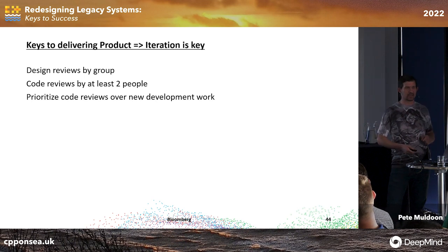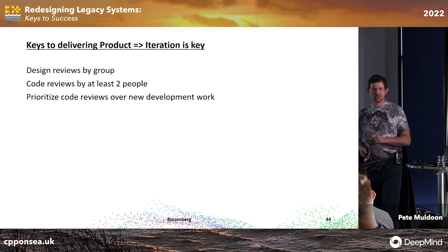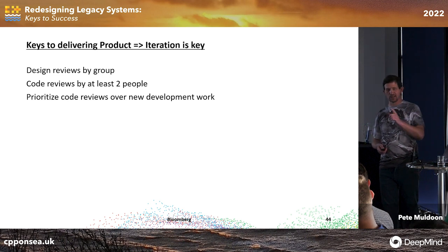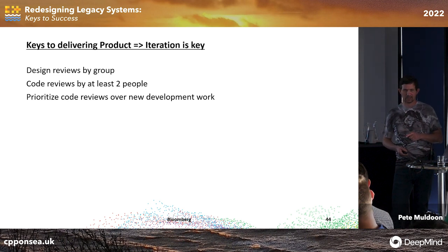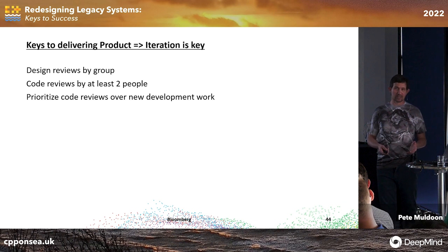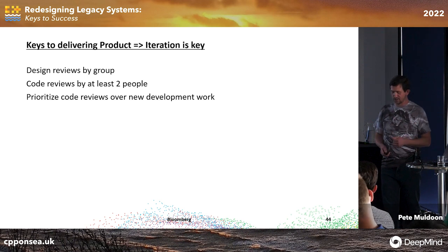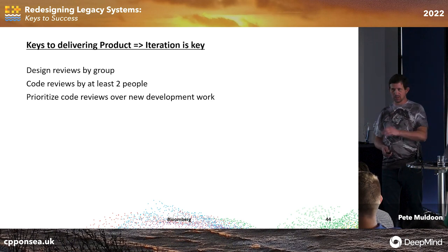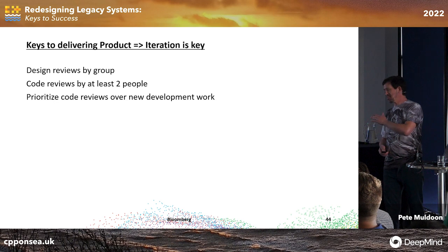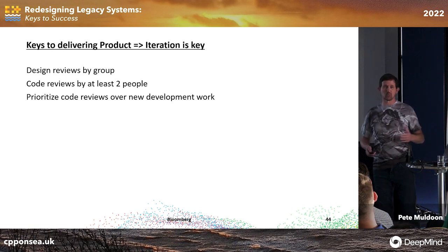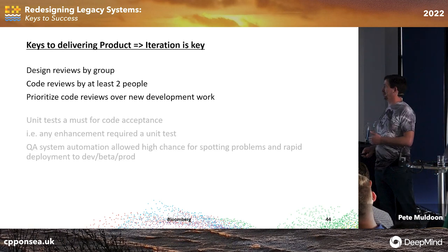But one of the key things is we prioritize code reviews over new development work, because we really like writing code, and we don't so much like reviewing other people's code. But again, until you merge your code into the code base, you haven't realized any work. It's just potential work. I would rather have four things finished than 10 things started and none of them finished. So in the beginning, I had to almost issue an edict: code reviews, you do it. And if it's a re-review, that's even more vital, because you probably just have to put a check mark and then we can merge it. So again, how do you get your work to actually materialize? You got to get it through review.